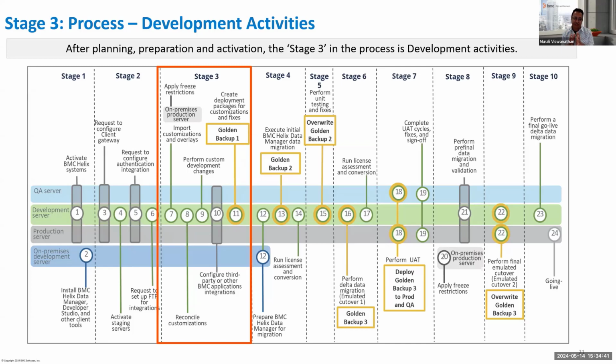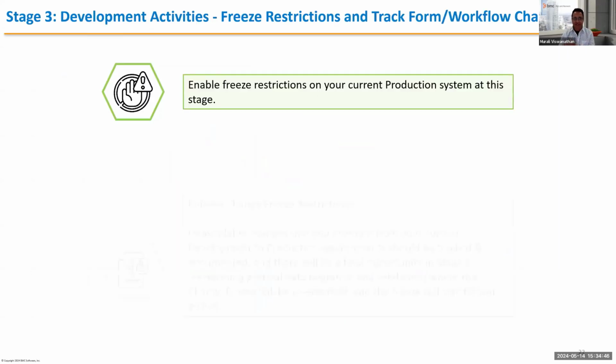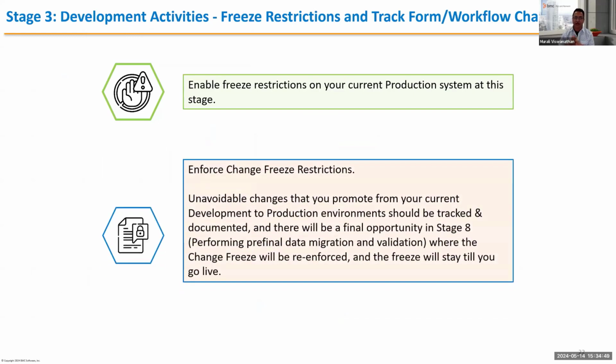The other major stage where you'll be working is the data migration, which is stage 4. Okay, so on stage 3, before you start, if a customer has some cycles to promote data from dev to prod, let's make sure that you pick a date where most of the milestones are already accomplished and everything is already promoted to prod, and there are no major change requests or milestones in the next 3 to 4 months. If there's anything coming in the next couple of weeks or a month, see if you can work with the customer to prepone those activities and move that code earlier.